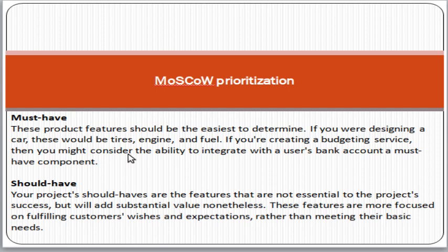For example, the payment feature in an e-commerce solution, what do you think, should it be must have or should have? It should be a must have feature, because without a payment feature the customer can't purchase any product from the e-commerce solution. Okay, so on that basis you can categorize.